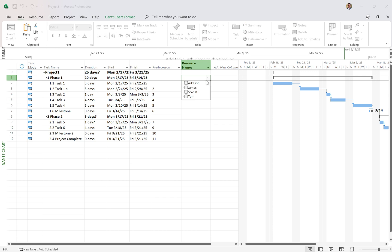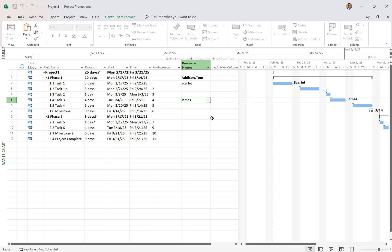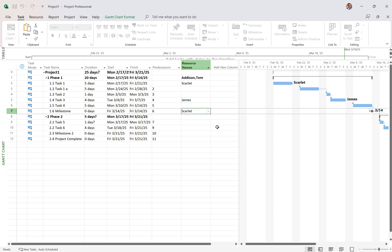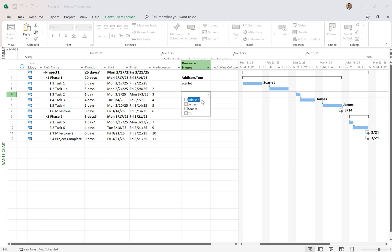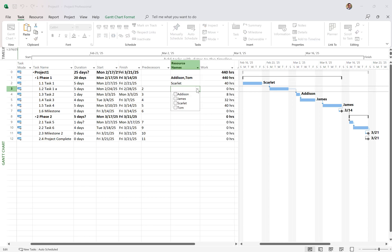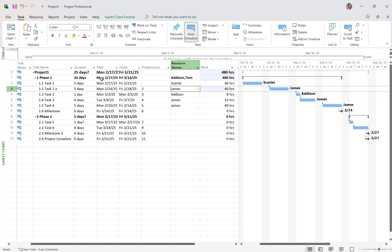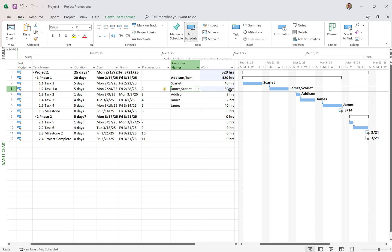Now I can come to the Resource Names column and say who's working on which tasks — Addison and Tom on Task 1, Scarlett on Task 2, James on Task 3. As a rule of thumb: you can assign a resource to a milestone, but don't do it. It won't show up in the Gantt chart. A milestone is a moment in time — it's not a task to be completed; there's no effort, no duration, no work associated with it. As you add a resource to a task, the hours will be calculated. For example, 40 hours of work is based on 8 hours a day for 5 days. If you add a second resource, that becomes 80 hours — more people working on the same task for the same duration.